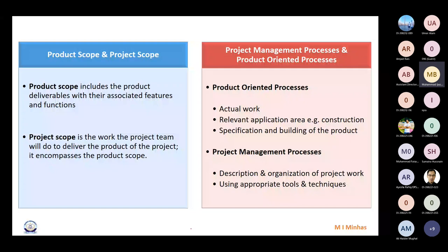Similarly, if by phase you only mean that we will do this project in two steps, in this case you might have only a single charter, a single plan, and then you move on. It would be written in the charter whether we have to treat these two projects officially as separate phases or not. If you treat them as two separate phases, you might require a separate initiation, a separate charter for the second phase, right?